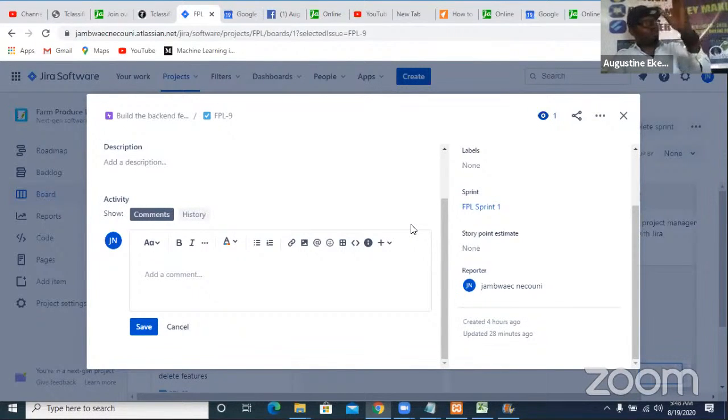So you can actually build out your epics. Once you're done, you go to Backlog, put all your issues. Once you're done, take them to the sprint and to the to-do. Then when you go to to-do, you can add the epic to affect the very issue that you're looking at. You understand? Because when all these issues are complete, after the to-do you have in progress, review, and done. When you're done with all the issues under an epic, that epic will be set to completed, isn't it? So that when you do your report, it will be effective.